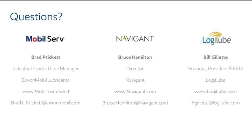Sure, exactly. And I'll reference from some past experience. Typically, we work very closely with the reliability engineering team at the client site. And since we have the ability to illustrate real-time data, 30-second interval data, corroborated with the physical oil sample data, upon commissioning, we actually work with the reliability engineering team to determine what are the condemning limits, what are the warning limits, both high and low.